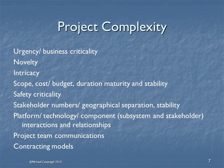There are project-specific complexities as well: urgency, number of interactions, how new this kind of project is to us, stability of the overall project envelope of scope, cost and duration, and whether it is safety critical — can people be injured if the project doesn't deliver the required outcome? And particularly the communications between the various stakeholders, which is a function of their geographical separation and the level and quality of their relationships.